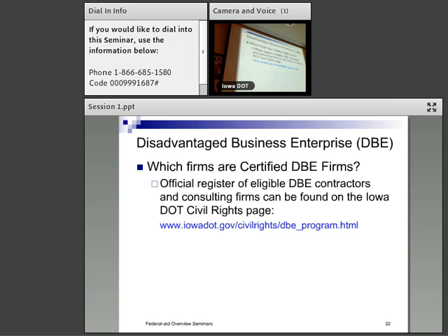We didn't show up on the job site that day, so we're not entitled to this last $900, and sent them back a check for $900. So when the project's being closed out, we find that there was $900 under what the DBE should have been paid, and the prime is going to be assessed. There's going to be a price adjustment for this because the commitment wasn't made.